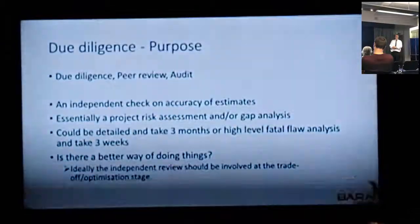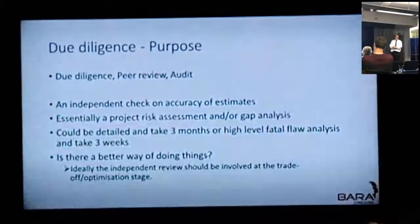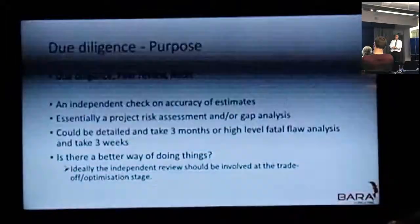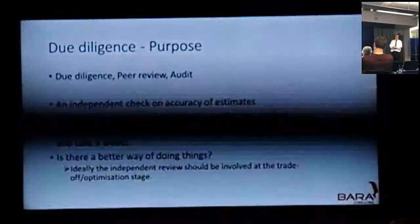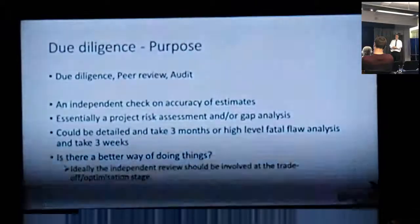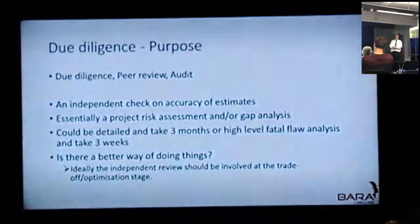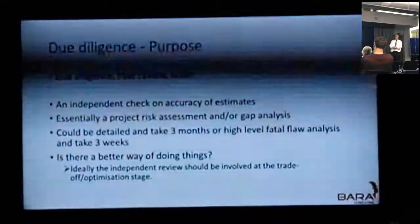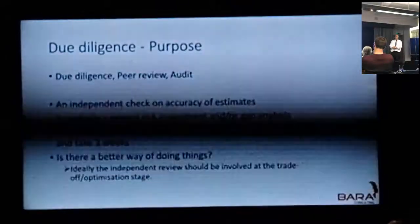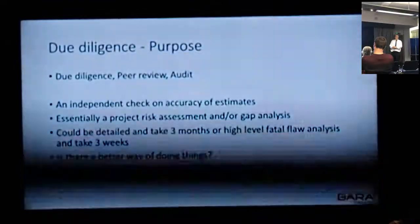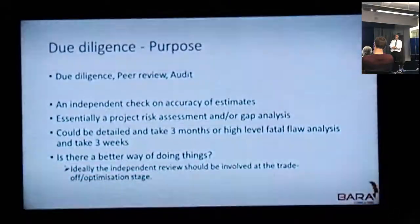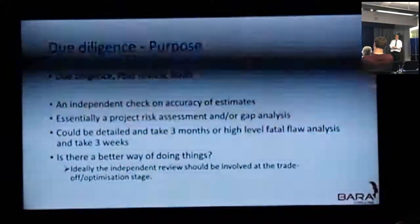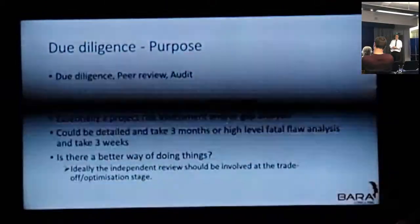Let's move on to due diligence. Whether it's a due diligence, a peer review, or an audit — they're kind of similar things. I'm often involved with my colleagues as expert witnesses, which is a similar sort of job. It's an independent check on the accuracy of the estimates — essentially a project assessment and gap analysis. It could be detailed and take up to three months to complete. In my experience, when it's a long detailed due diligence, it's a good indication they actually really don't want to buy it or lend their money — they're trying to find issues. If it's a high-level gap analysis that only takes three weeks, in my experience they've already made the decision and just want someone to confirm it.